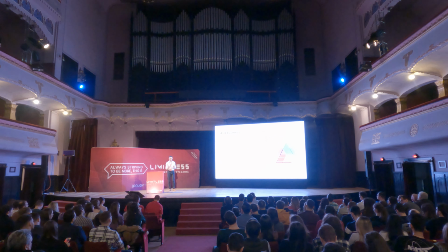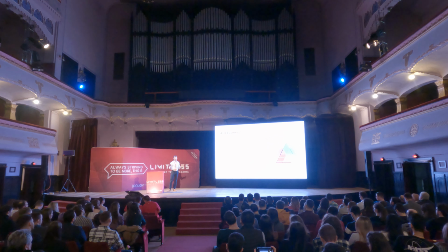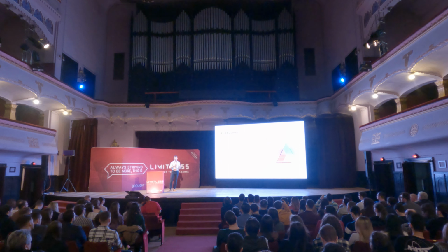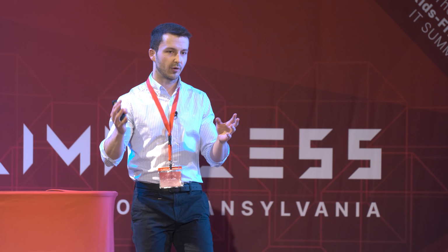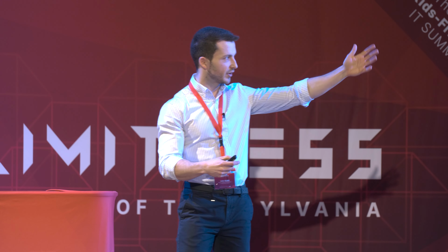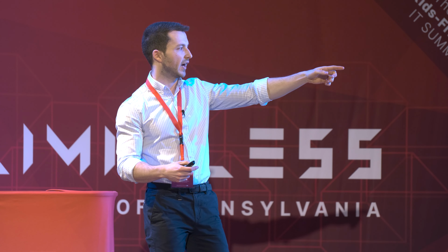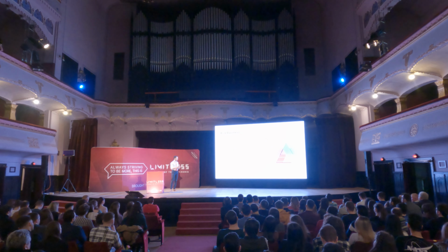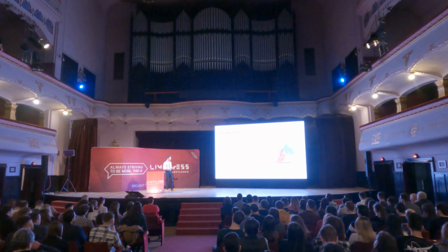If you have a fixed team of 4 developers, let's say, of course it would be faster to create an app if all of them work on the same code base, instead of 2 working on iOS and 2 working on Android. But if you can have more developers working on native iOS and Android and cost is not a problem, then you will be able to build those apps at the same time, and you will be, again, fast to market. But on the triangle, of course, you'll have quality and time, and the budget will rise quite a lot. But this is one thing to keep in mind if time is more important for you than the budget.